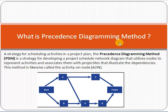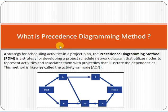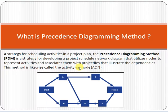Please subscribe to my channel and click the bell option so that my new videos can reach you. Now let's start. The Precedence Diagramming Method is a diagramming method — a method to make a figure, a diagram of activities. It is a strategy for scheduling activities in a project plan, for developing a project schedule network diagram that utilizes nodes to represent activities and associates them with arrows that illustrate the dependencies.